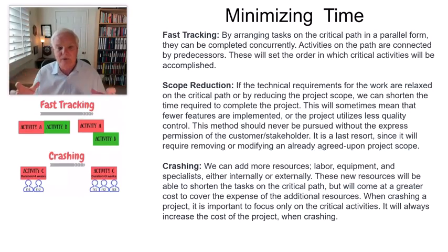It is one of the most destructive things to a project. And the reason I say that is every time you do that, it will always increase the cost of the project. Your budget will go nuts when you're crashing it. You may come in on schedule, but you will overrun the budget.